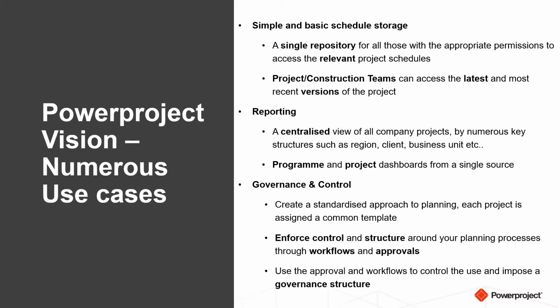It allows you to standardize that approach to your planning to fit within your business, and enforce that control and structure around those planning processes. And it's the simple things, from the basic storage: where's my latest version of the project? Is it on someone's desktop? Is it here or is it there? It's always where the latest version is. It's always kept, and you can see the last time people have updated it, and only the right people have access to it. So again, in the workflow, you can have approvals to move it across the different stages.